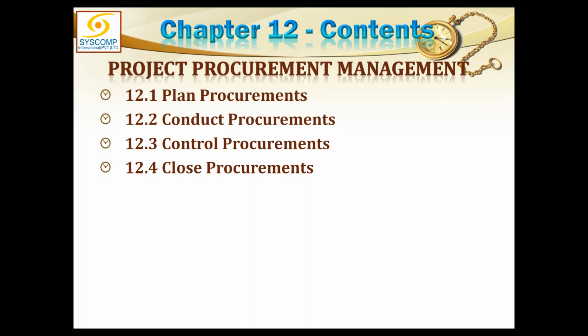Maybe a specific task or job or work is to be done in the 6th month of the project. Another contract is to be outsourced in the 9th month of the project. So if we do all this processing right now in the planning, the contract may or may not remain valid for such a long period, and then the conditions would have changed.